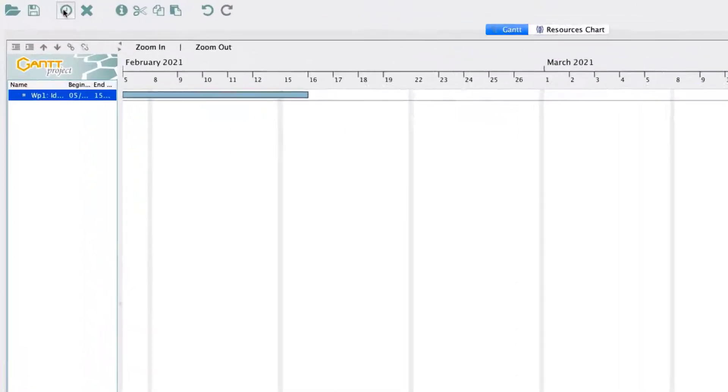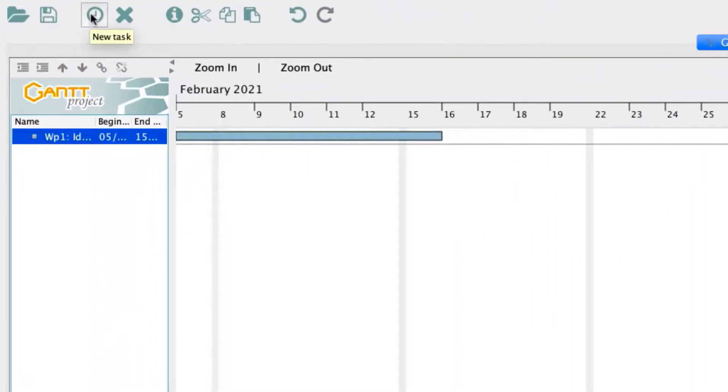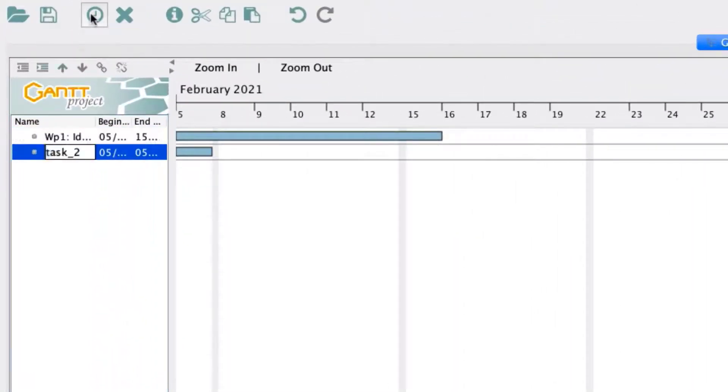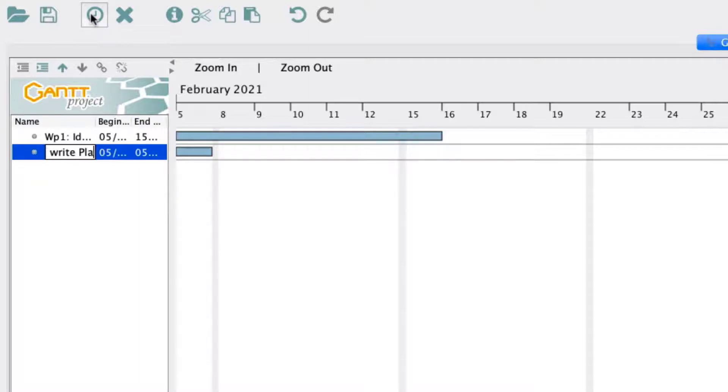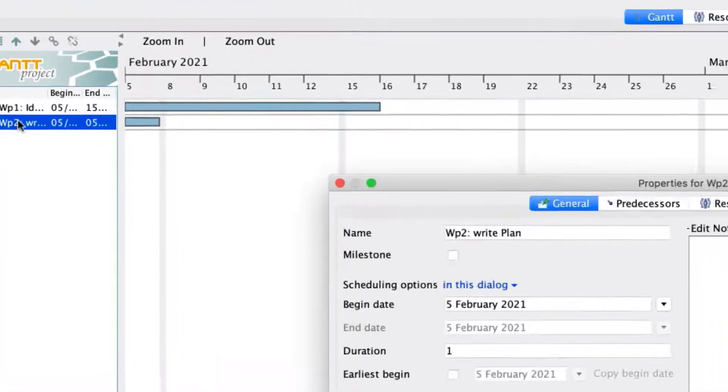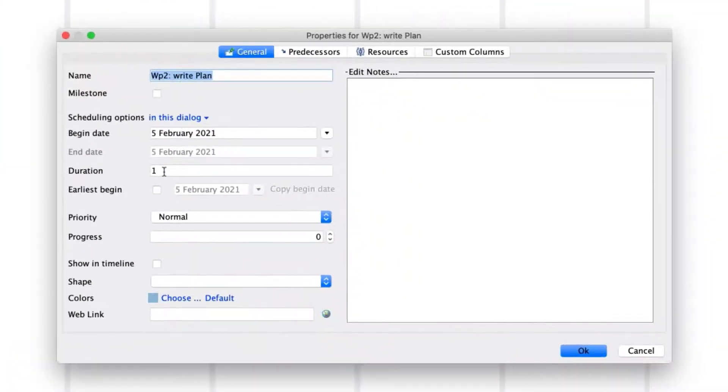To add the next Work Package, again select the New Task icon from the menu bar, and name this new task Work Package 2, Write Plan. Double-click this activity to open its properties menu, and enter a length of 28 days for this activity.